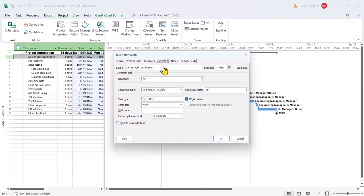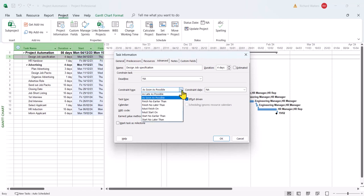As soon as possible means no constraint. And this is the method you also use if you want to remove a constraint. In this example, ours is start no earlier than.